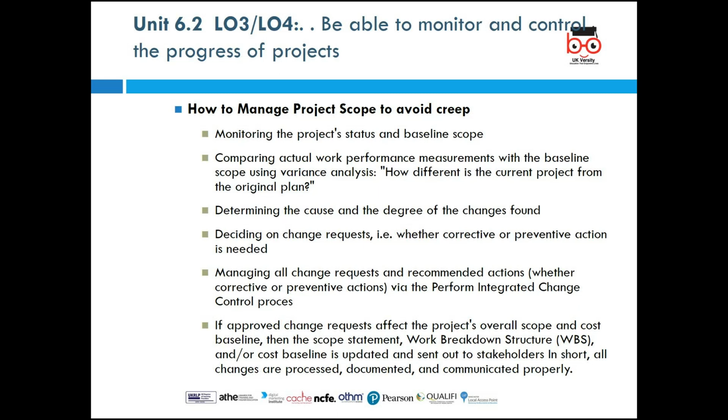And if the change request is approved as to whether the request affects the project overall scope and the cost, which is the baseline, then the scope statement, work breakdown structure, or cost baseline is updated and sent out to stakeholders.